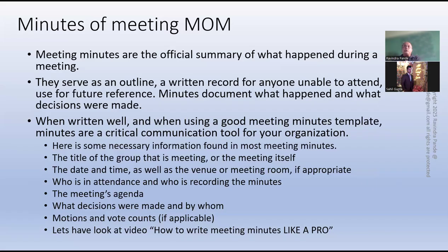So and so were present at that meeting. This was the chairperson. These were the points discussed. These were the action items assigned, and these were the closure dates given for the action items. So as simple as that, there are hardly four or five elements, and these things do change according to the organization's minutes of meeting template.